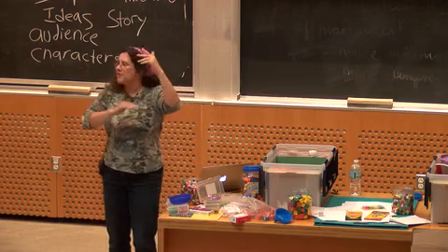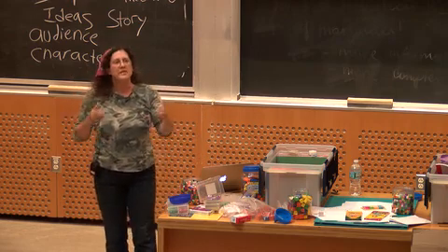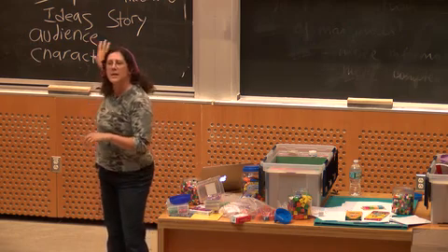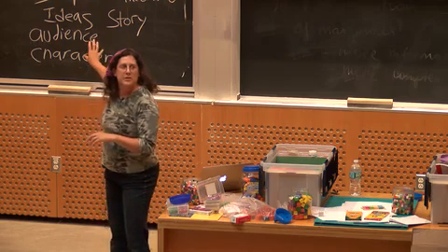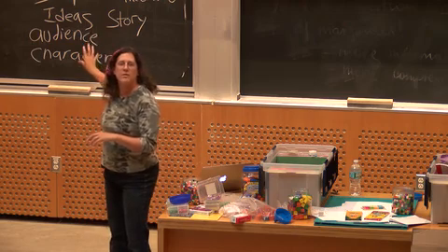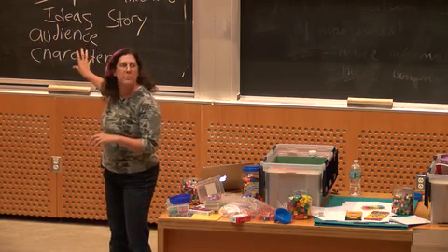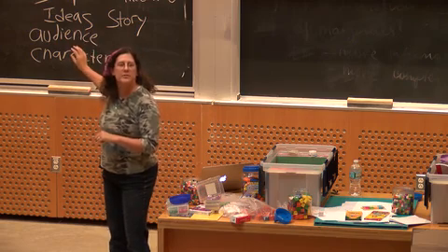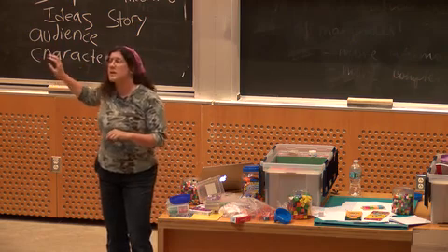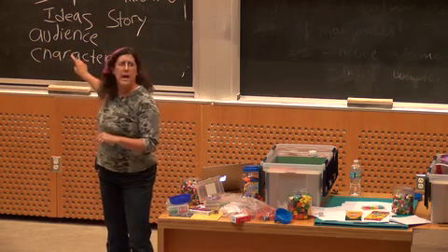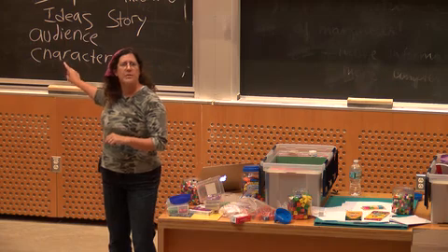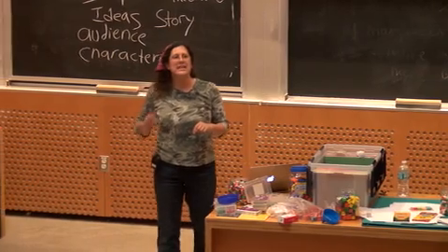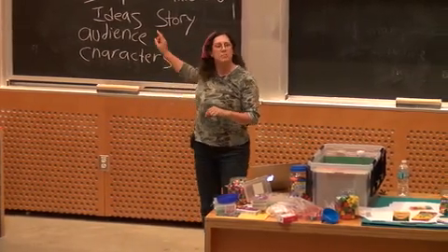But if that is the way your team thinks and envisions the game, that can be a very good way to formulate and encapsulate all of those ideas, especially if you can really drill down to what are the 4 things you want people to say about your game. And then every time you make a decision about your game, every time you add a mechanic, a story, a character, a setting, or make a change to the way the game works, you can go back, read those 4 or 5 bullet points and say, is this change actually enhancing and working with that pitch?